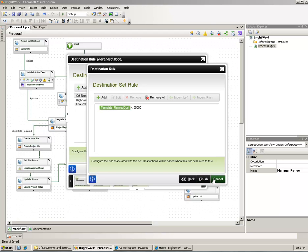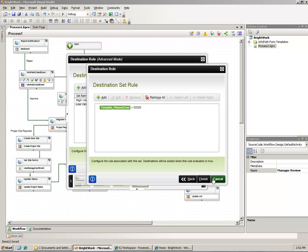What this helps us show is that throughout the process you can use a lot of the data associated with the tasks and the form to make decisions and perform different actions or involve different users based on those values. For instance, a project request that will end up taking nine months and cost a million dollars may take a different path that involves different people than one that would just take a week and cost a thousand dollars.